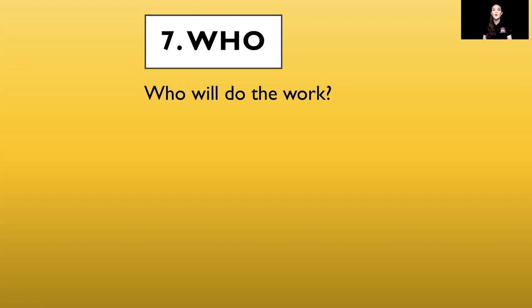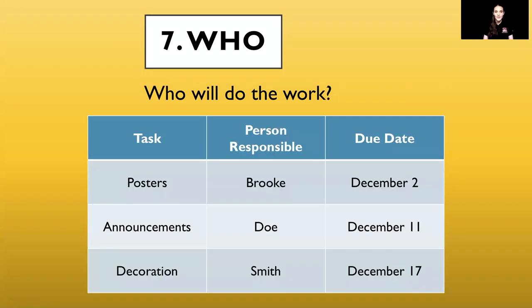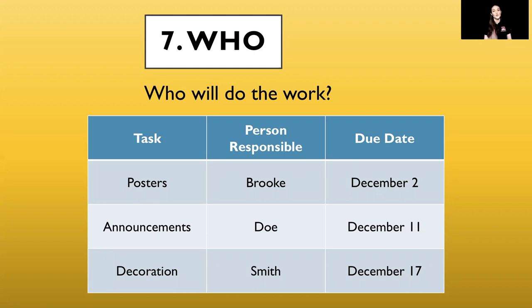Our seventh W focuses on 'who will do the work.' This will obviously look different from campus to campus and activity to activity, but here's a quick example. On the left we have a list of tasks that need to be completed; in the center, the person responsible for completing that task; and on the right, the due date for when that task needs to be completed. The first task is posters — I will take responsibility to get those completed by December 2nd.